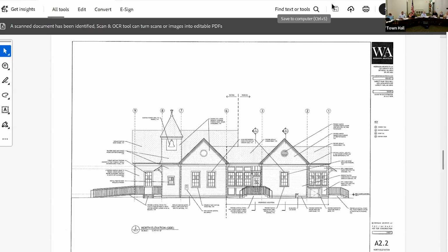The electricity is going to run underground from the pole. If we were to put it over here, we would be trenching along this side of the building. It's less than 2 feet, right? And it would be very costly to not do it by excavation. And if you excavate, you're going to damage these trees.